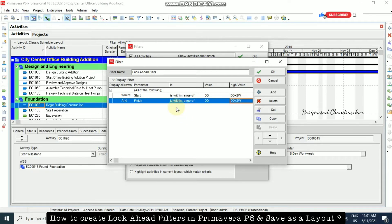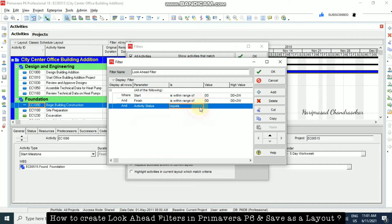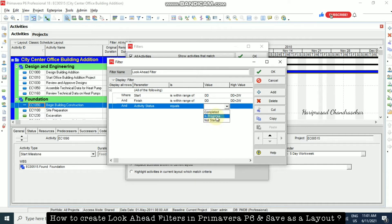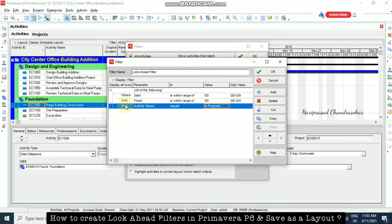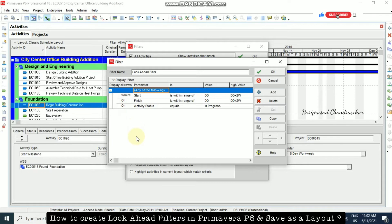Now we will be seeing only the activities which start after the data date, within two weeks, visible in our Gantt chart. If you also want activities that have already started but are in progress, click plus and go for Activity Status, set equal to In Progress. We need to make the logic 'any of the following' — not 'all of the following'. Any of the following means OR logic.